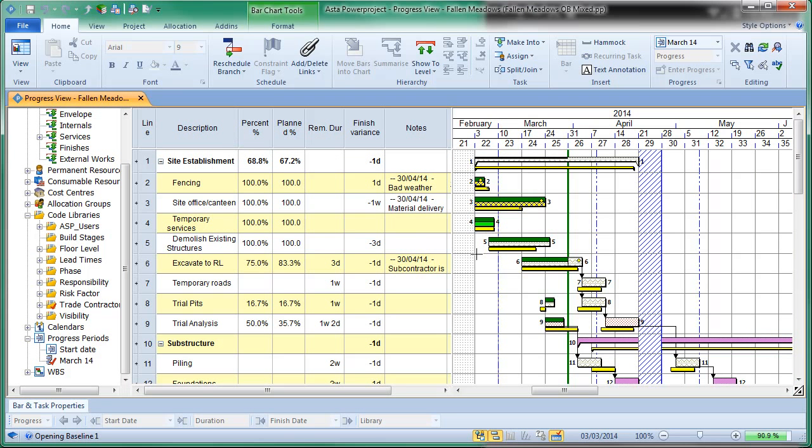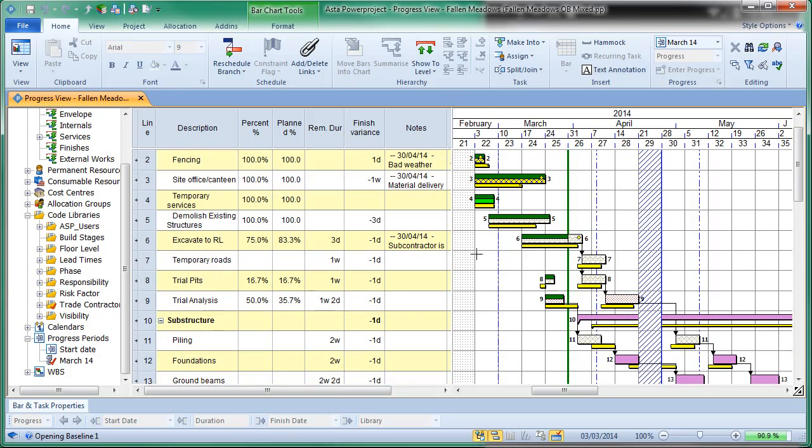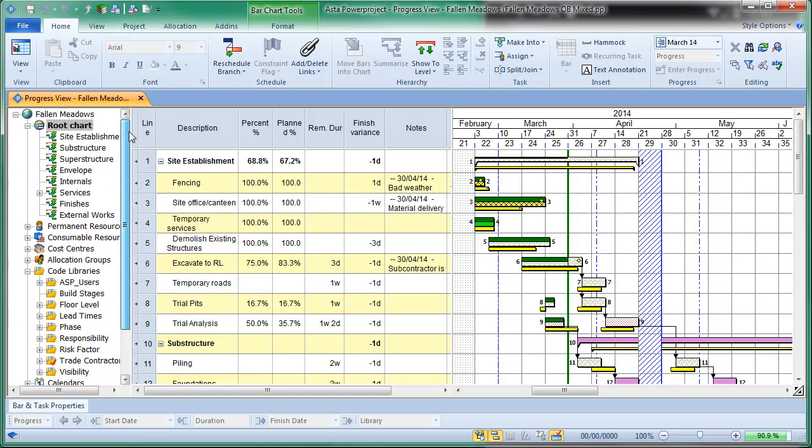So this is my straightforward project. It's got a work breakdown structure on the left hand side, and it's previously had progress entered, and I've said I wanted progress up to the 14th of April. So what Site Progress has done, it hasn't exported everything, so it hasn't exported those tasks that are complete. It's only exported those tasks that are not complete and are due to happen in that window. So this task will be there, but this one will not be, although I can also set a window a number of days ahead to capture that, and we'll look at that in a moment.